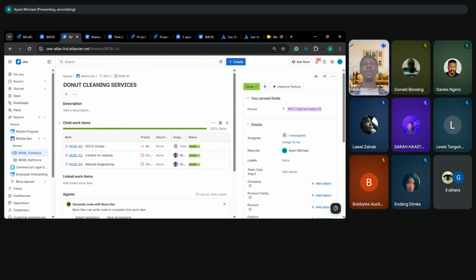But if you're a tight-knit team, and again, if your work is kind of cross-functional, you can have work that cuts across multiple projects, which is typically what you'd have initiative and epics for. So I can have an initiative that has epics from different projects, right? And as a project manager, I'm able to track all those epics within that project.